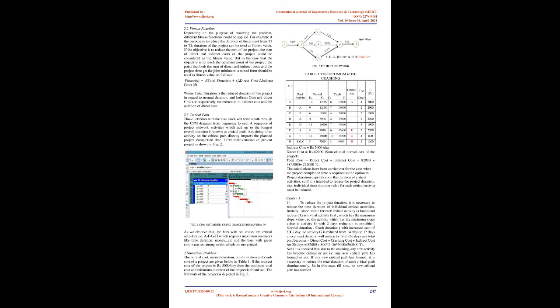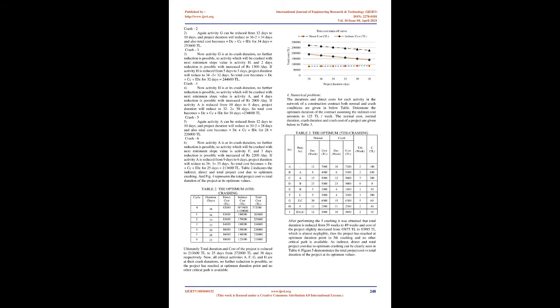Step 6: Reduce the time of the activity obtained in Step 5 to the least possible value, which is the minimum of: A) the reducible time of the activity TI; B) the minimum necessary time reduction of the not-shortened-enough paths passing through the activity. Step 7: Increase the duration of activities which are reduced more than necessary until no new not-shortened-enough paths would be generated. These activities occur on paths in which DN-TP < 0. If all paths have been shortened enough then stop; otherwise update the effective cost slopes of the activities on paths that are not shortened enough, then go to Step 5.